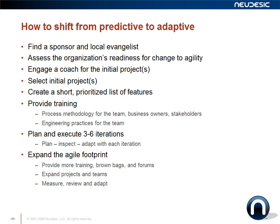Once you have a coach engaged, select an initial project or series of projects. My recommendation is to start small — you don't want to introduce agile across the entire organization at once. Take a small team or small product as your pilot or sample case. The goal of this pilot project is to show positive benefits to the organization and help answer how this methodology can benefit the organization in the long run. You want to create a short, prioritized list of features to support the project, which doesn't need to be extensive and will grow over the course of the pilot.